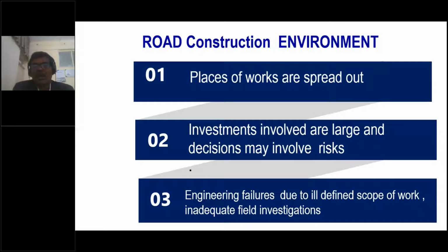And this DPR is also prepared, as you know, by investing crores of rupees. The DPR cost is somewhere around 3%. Let's say if it's a 500 crore project, the cost of preparation of the project report runs into crores. The consultancy fees.